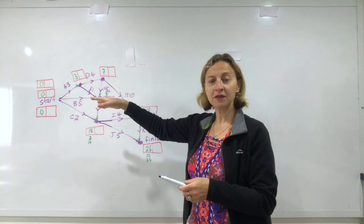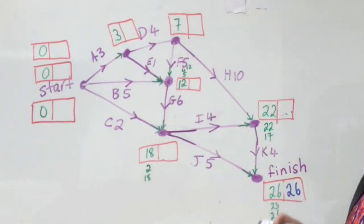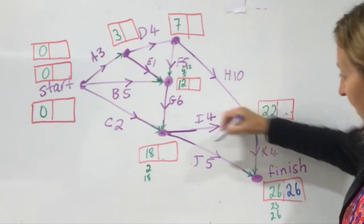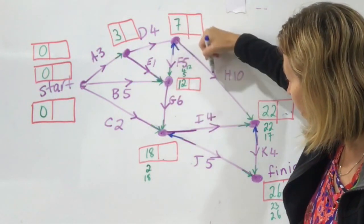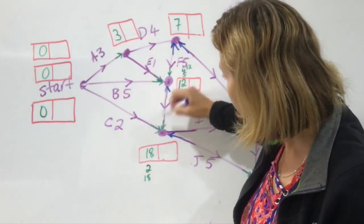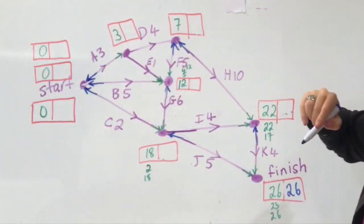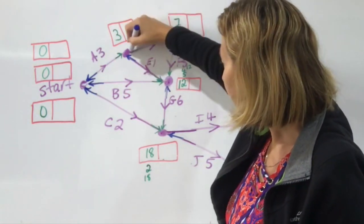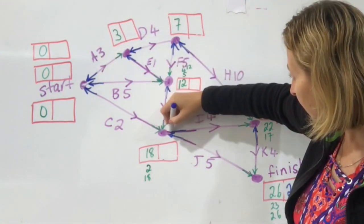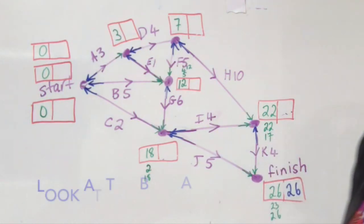Now let's do backward scanning, going from right to left. We're looking for the smallest number going into each vertex. Remember, at the finish we start at the same value as our earliest starting time, which was 26. We go in the opposite direction of the arrows. I like to use a different color to attract attention. If I've missed one, I'll realize when doing it that something's missing and fill it in, because there's a lot of information.